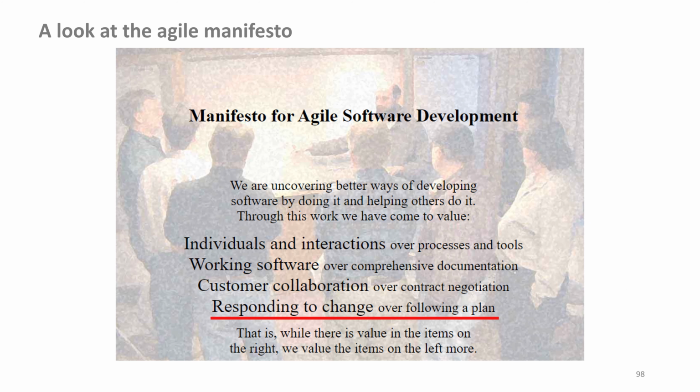We remember, the Agile Manifesto says, responding to change over following a plan. So we continue to make plans. The focus is on value creation, not on plan fulfillment. Every sprint, we do sprint planning for the next few weeks. Every day, we do a daily Scrum where we also plan the next 24 hours. We even plan in the sprint review through the feedback we get there.